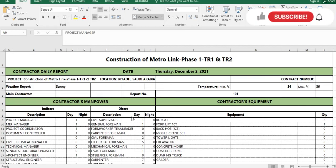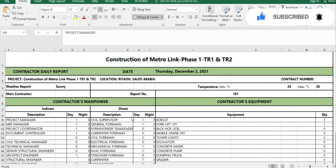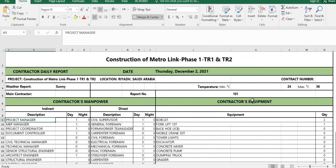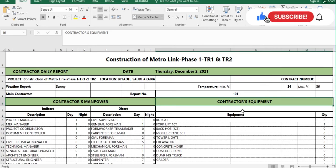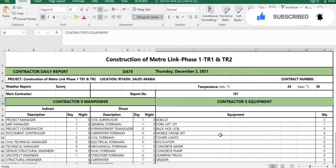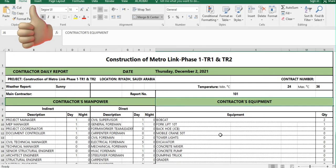In every progress report you have to put data about the manpower present at site, equipment being used at site, daily activity progress, safety activities, man hours, toolbox meeting, material receiving at site, and pictures of the activities. These are the common things in every progress report.